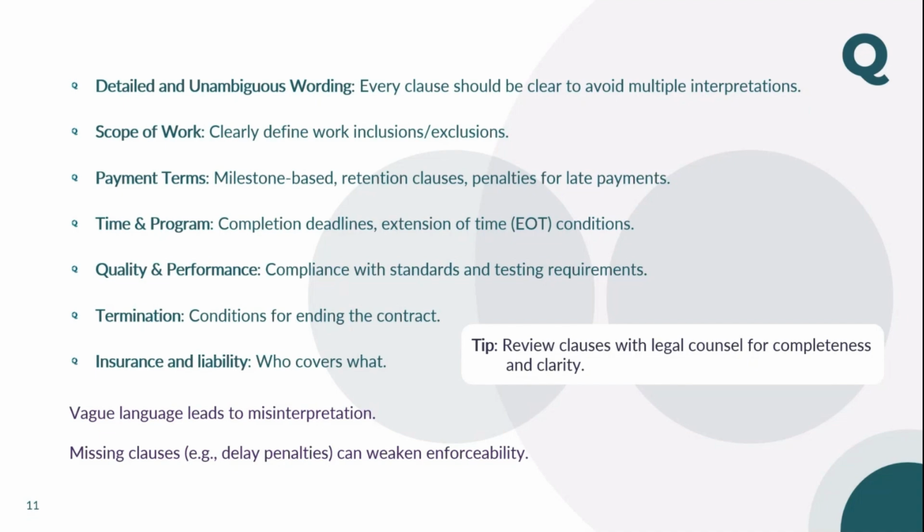Now let's look into the cost part of it, which is payment. Cost or money is the blood of the concession. Without money, you cannot survive in concession, and your project will be lost completely. So to ensure success of the project, you should check where the payment mechanism is mentioned. What is the payment term? How are you going to pay? Is it a check? Is it LC payment? Is it a direct payment? Is it a bank investment? All these things you have to mention in the contract, or you have to make sure those terms are there in the contract. So I said we are talking about the sufficiency of the contract. So first, obligation, then the time, then the payment cost.